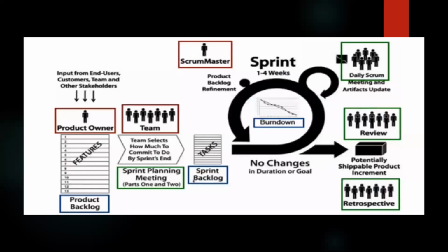So before each sprint, the team selects what it will commit to deliver by the end of the sprint. So the team creates a task-level plan for how they will deliver. Also, the team works together to create an initial assignment of tasks, and compares total estimated task hours with total estimated available hours to make sure we are not going to miss the delivery.